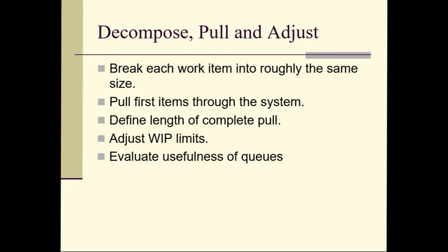This avoids a lot of work in progress that can cause waste when there's a design change or a problem. If we design the whole system up front, now the builders are building the whole thing, and then there's a minor design change, all that stuff that the builders have been building is wasted, but all of that design work that was done in advance could be wasted as well, as we have to do a redesign. So if you design just in time, there will be less impact, less waste from a significant design change. So we call this pulling through the system.